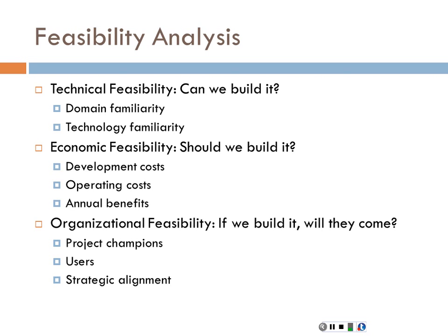So you want to focus on such things as, if you're employing a consulting team, what are the billable hours for that duration of the project? What's the cost of the infrastructure if you're going to be investing in a database, for example, or in various CASE tools, whatever else you need to build the system, servers for the system. Those are typically sort of the one-time costs.